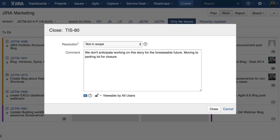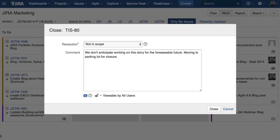Using things like components, labels, you can close issues, create a custom resolution called not in scope, so they're easy to find. But then tag with components, labels, and other things so that you can find them. As you're doing new research, you can search back through these issues to see, are our priorities right? Is our roadmap right? Mine the data for customer info. But don't necessarily hold yourself hostage by all these issues that aren't on your medium to long-term roadmap. You're not necessarily bringing yourself extra value by having more issues open. It just makes your job harder. We can use JQL, Jira's query language. We can run all kinds of searches inside of these closed issues to make sure that they're not lost.